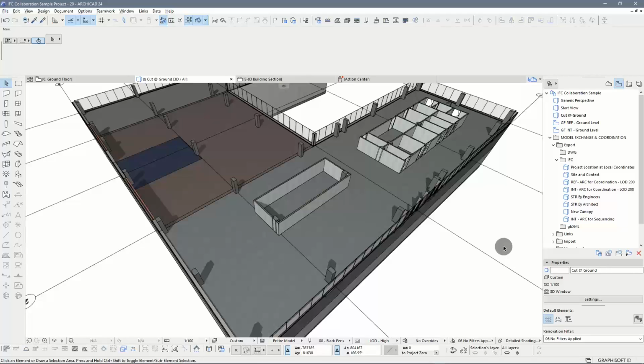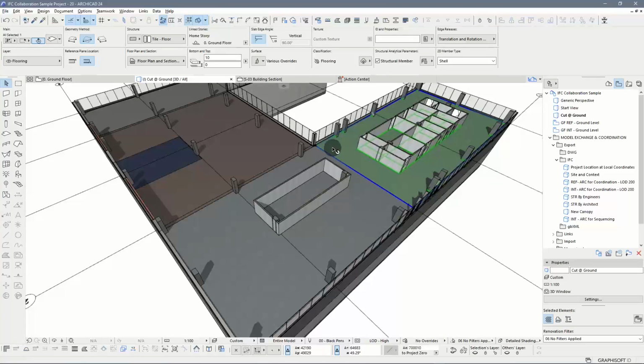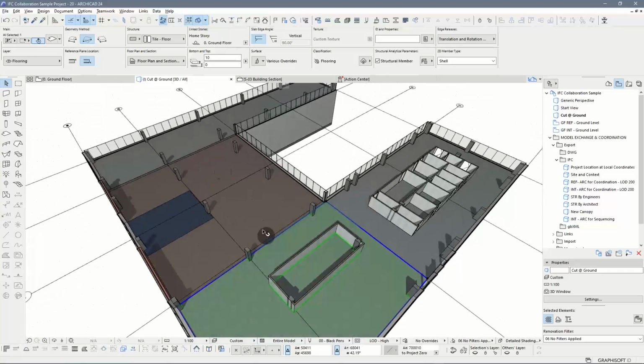But if you need to do it from your own side, and that might be the case, then you will need to start splitting something that normally, or for the purpose of design, will be a single element, like that tiling there, and then split it into bits and pieces just for the sake of adjusting the model and turning it from a design model to a construction model.